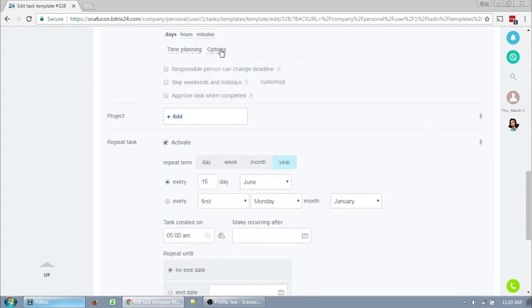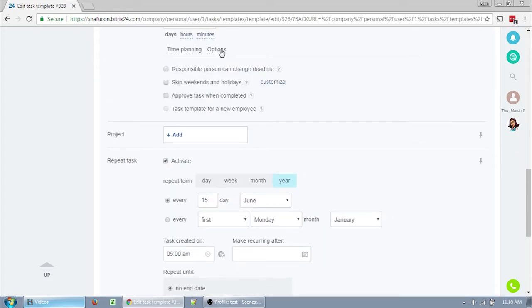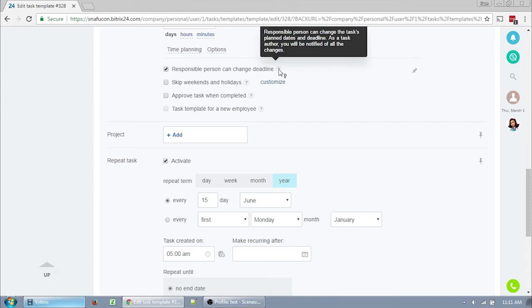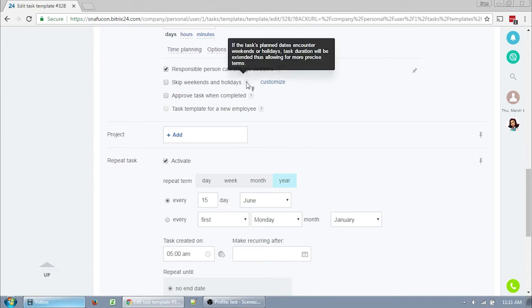If you click options, you have a few more fields that pop out. Responsible person may change the deadline means exactly that. I like to leave it clicked, otherwise only the creator or an admin can change that due date. However, there are many times I've forgotten because it's hidden behind that options link. Skip weekends and holidays doesn't really make sense for us because a lot of us do most of our work on the weekends, so you're not going to want to check that box.